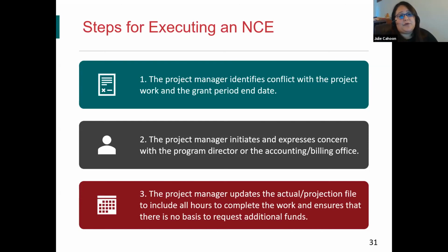The next step is then to have an internal discussion about your identified risk. So you'll want to go ahead and meet with your project director and express your concern. You'll also need to connect with your internal billing or accounting office to understand the impacts from the budgetary aspect of your work. So the next step is then just having that internal dialogue. Is there really a need to do a no-cost extension? Are there other mitigations to meet your deliverable and the demands for the health assessment that you're conducting in this example?